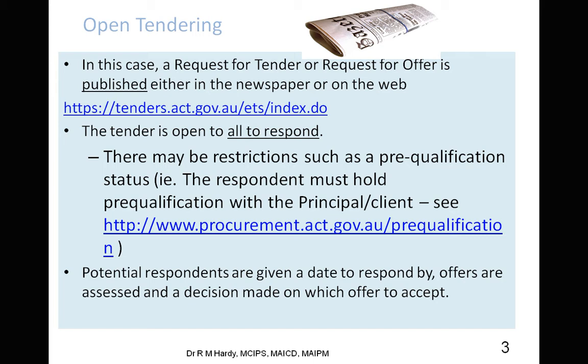the architects. Then the tenders come back in by the tender date and time, and this is a very specific thing. And this is a trick question that the architectural practice exam often asks you. You know, if a tender comes in 5 minutes late, can you accept it? The answer is no. Shaking of the head over there. So the answer is that's correct. The answer is no, because a deadline is a deadline. Okay, so we have to be fair to everybody who's putting in the price. And if we accept something outside of the conditions that we ourselves have set, that's not a good sign.